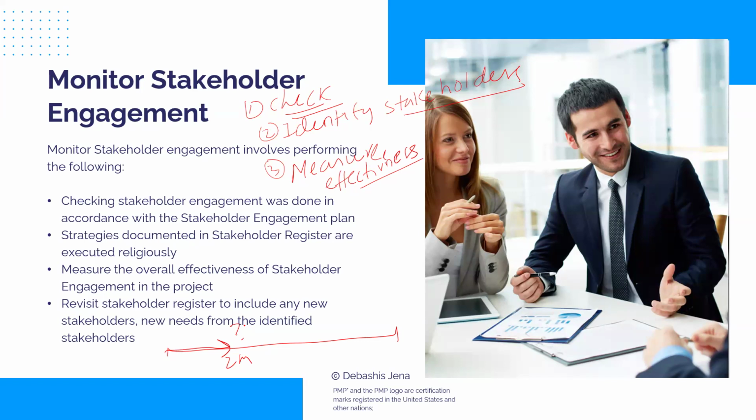So that's all I do in monitor stakeholder engagement. 3 things. We check whether the engagement modes and strategies are implemented. We identify more stakeholders and more needs. We also measure effectiveness and take corrective actions as required.